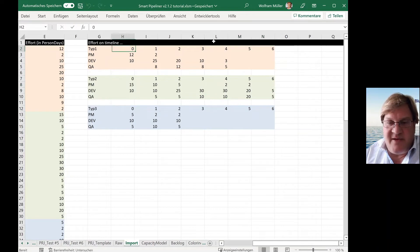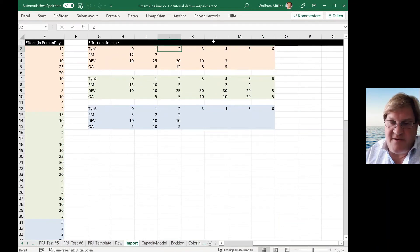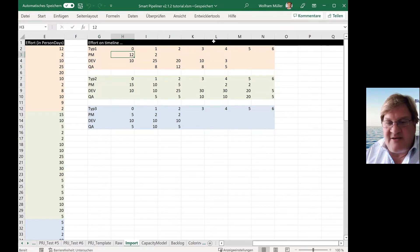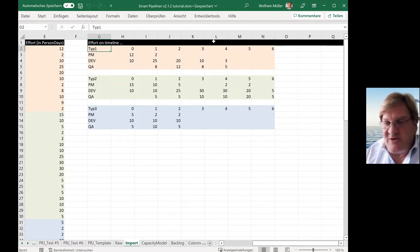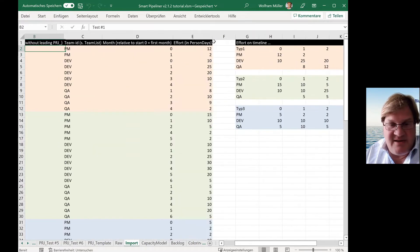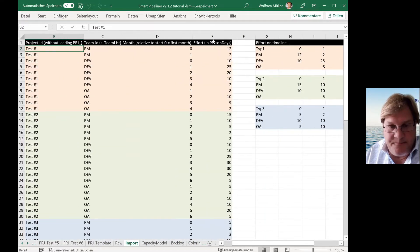So you know you have four months and you have the load, how much effort you need and I just showed it here in the typical way. So you have month, first month, second month, third month, you have the teams, you have the person days. That is typically a planning you should have as project manager out of the budgeting process. So you can easily put this in a list.